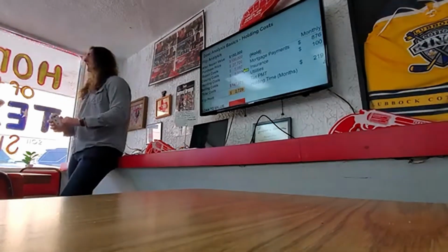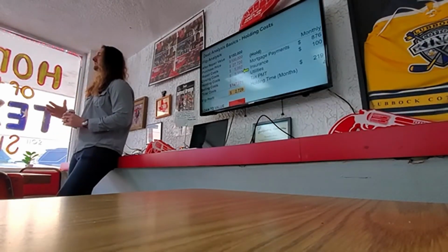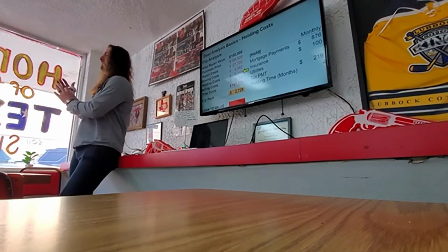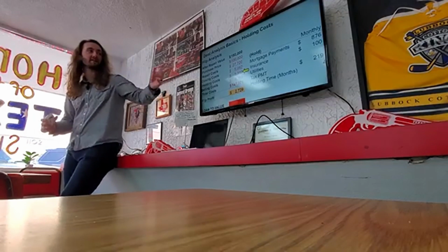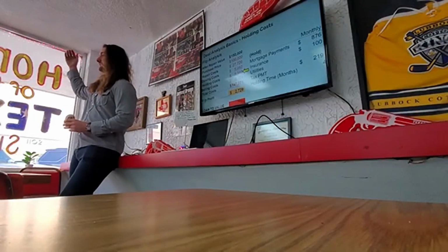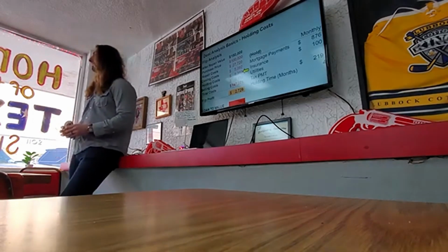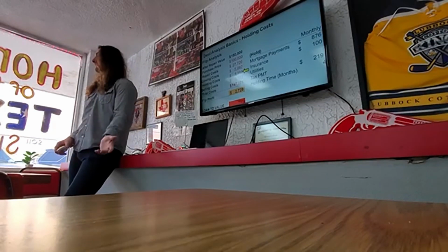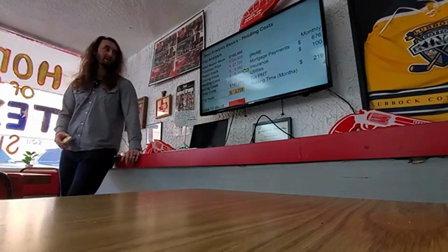I don't have the exact number off the top of my head, but the calculator takes our budget and assigns a number of weeks to that. Also, the more expensive the ARV, the longer it typically takes to sell it, so we add that in. If this property's ARV was 300K, the holding time might be 6 or 7 months. So it's a variable based off that.